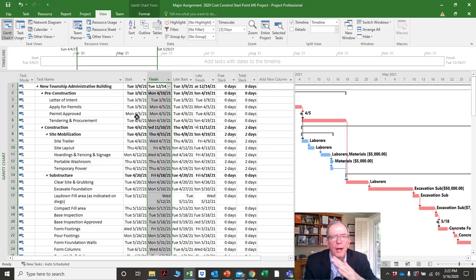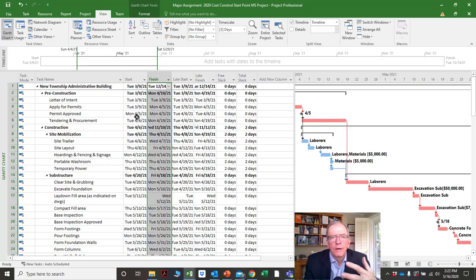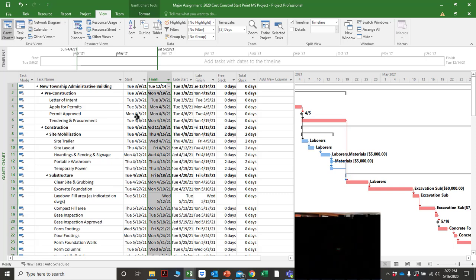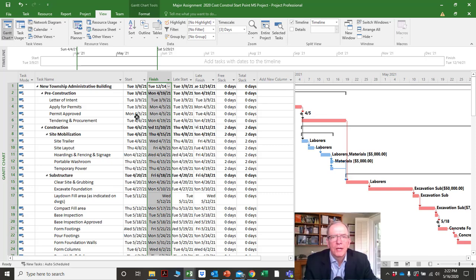To calculate the critical path, there's an algorithm with what we call a forward pass and a backward pass. You can do this manually — in fact on my YouTube channel I'll have another tutorial showing how the critical path is actually calculated manually.